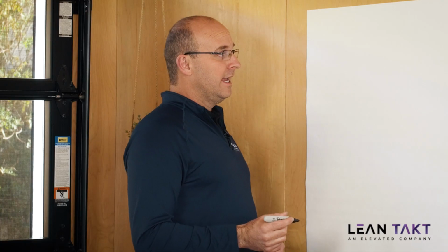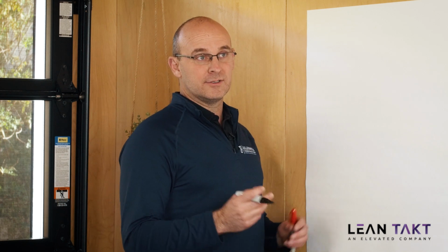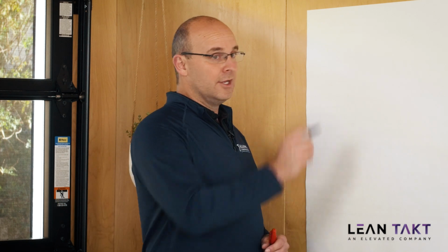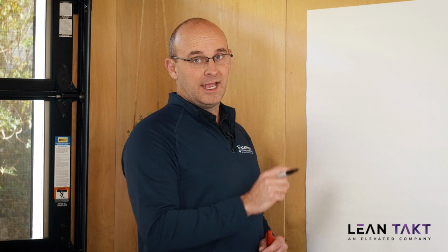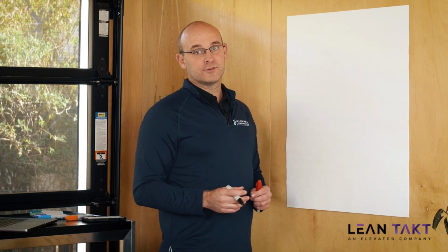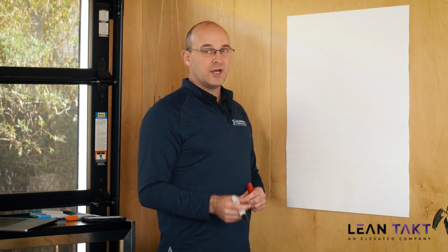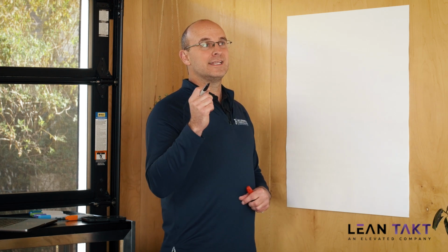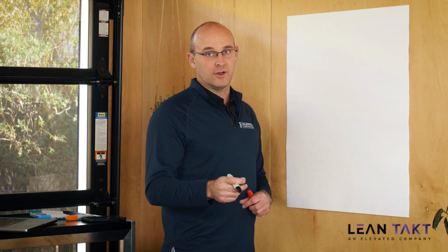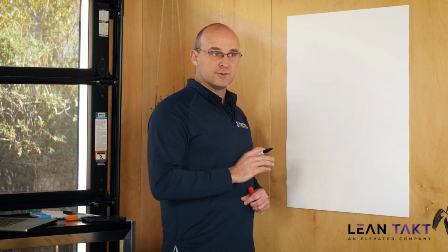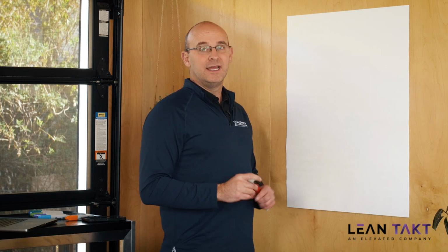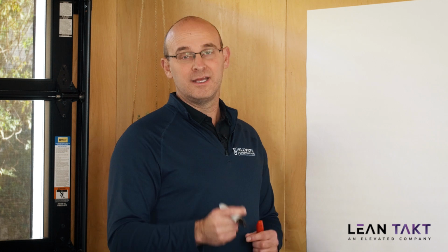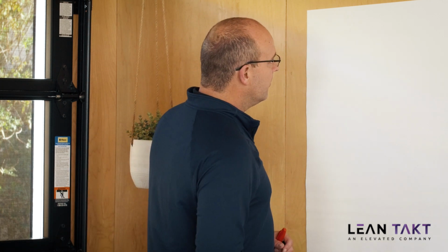In a construction schedule, and specifically with traditional CPM, you'll create sequences and link that to a work breakdown structure, and you'll get an overall total project duration, but the logic is very complex and the schedule gets very, very long. What the schedule will then do is a forward and backward pass, identify your longest path, and identify what's called a critical path. But here's the problem. Let me just use an example for this.